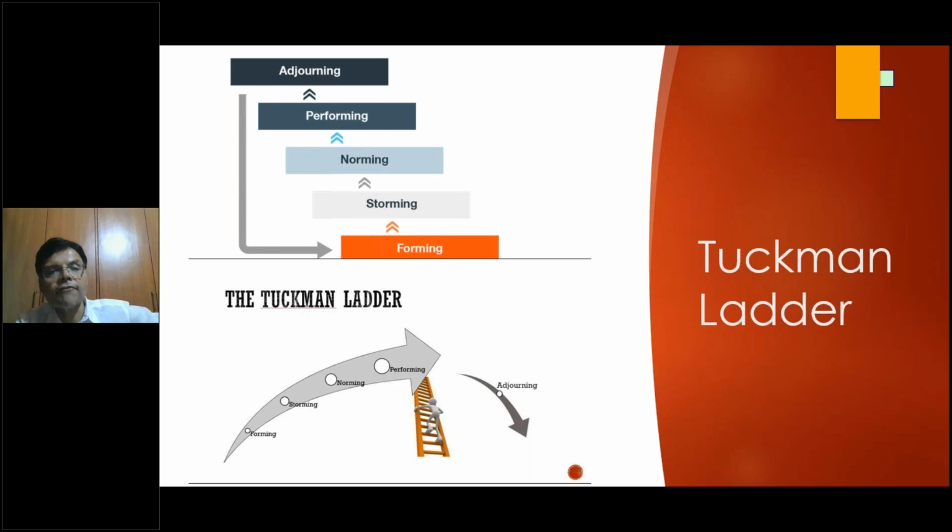The second biggest mistake that we made: whenever somebody leaves my team, or somebody new joins the team, I have to repeat this process, forming, storming, norming, again. That becomes hugely difficult, friends, with such a big team of 110 people. So not everybody, but at least for 5 to 10 people together, whenever they leave, join, or after a period of time, you have to repeat. If you look at this arrow, adjourning comes back to forming again.